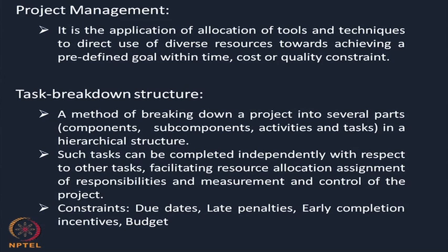And point number 3 is, there are certain constraints like due date, late penalties, early completion incentive, budget, etc. Whenever you are taking up a project, there must always be a due date. I have to complete it by this date. If I cannot complete it, nowadays there is always a penalty clause. If you cannot complete it in 6 months, if it is delayed by another 1 month, say there will be a penalty of 1 lakh rupees, something like that.